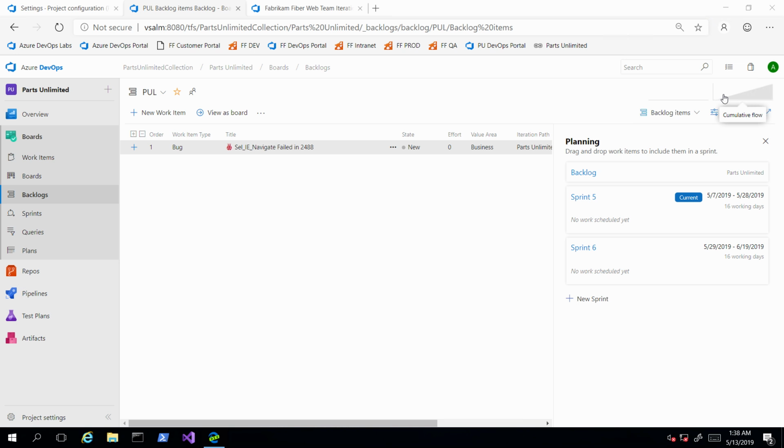So you're basically asking if you've got one team and you can have multiple projects and a team be associated to multiple projects. So this comes back to that whole discussion of what is your backlog, what is the scope of your backlog. If you're managing those two projects on one backlog, then you've got a team, and that team has a backlog, and you assign the work item. So it might be one project, it might be 10 different projects. If they're managed on one backlog, you can just assign them into the team, and that's what they see and that's what they do.